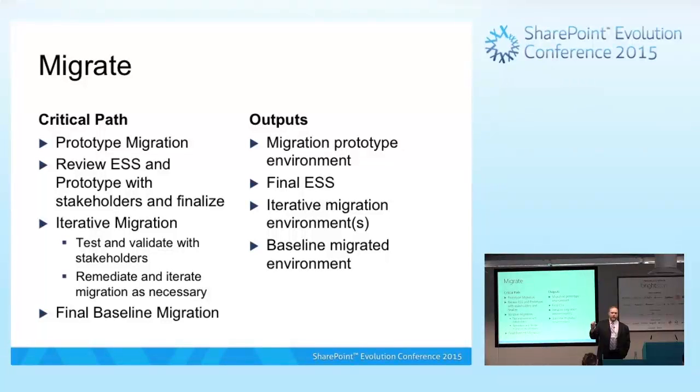or whatever. Those use cases mapped to those requirements, you really should have those refined and completed by the end of the build stage. Because here, we need those stabilized in order to iterate through the updates to the ESS, which is going to, we have 400,000 sites, and the site map is changing. We're going to tweak this, we're going to tweak that. These sites are going to collapse, these sites are going to split out, these people are going to be assigned to those. But site by site, you should not have your sites defined as requirements.